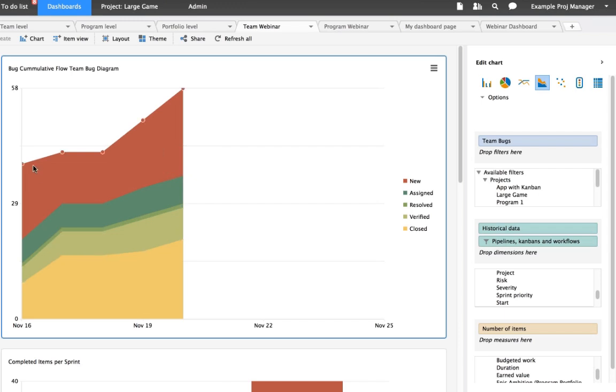What's going to happen here is that you can see in the beginning, the first day, we had a pretty flat arrival rate and a pretty steep departure rate. So therefore, it was a little bit narrower, we had a smaller lead time, less work in progress. But as soon as this starts to ramp up, becomes steeper, a higher arrival rate, and a very flat departure rate, as you can see here, the work in progress in between here is going to start to grow, which is obviously not a good thing. So this is just a nice way of being able to visualize that.